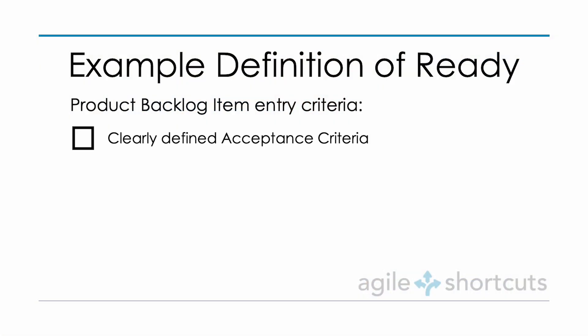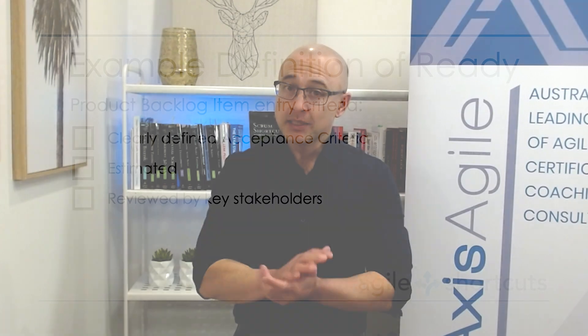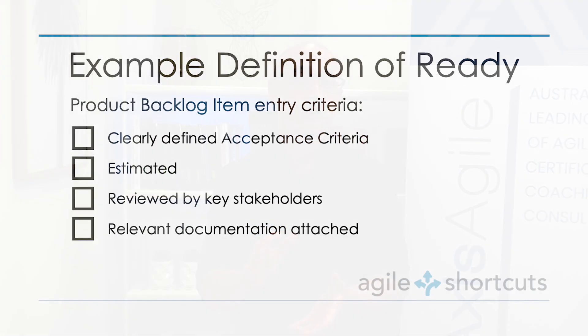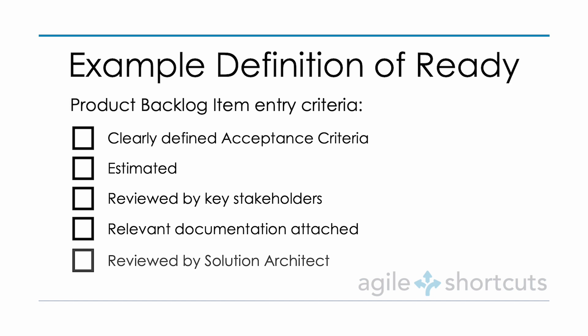The Definition of Ready specifies the quality constraints for what can enter our sprint cycle — specifically our product backlog items. Both the Definition of Done and Definition of Ready are checklists. Examples on this checklist include clearly defined acceptance criteria, work estimated perhaps in story points, socialized with certain stakeholders, additional documentation, and other people who might need to be involved — such as a solution architect to review dependencies and technologies.